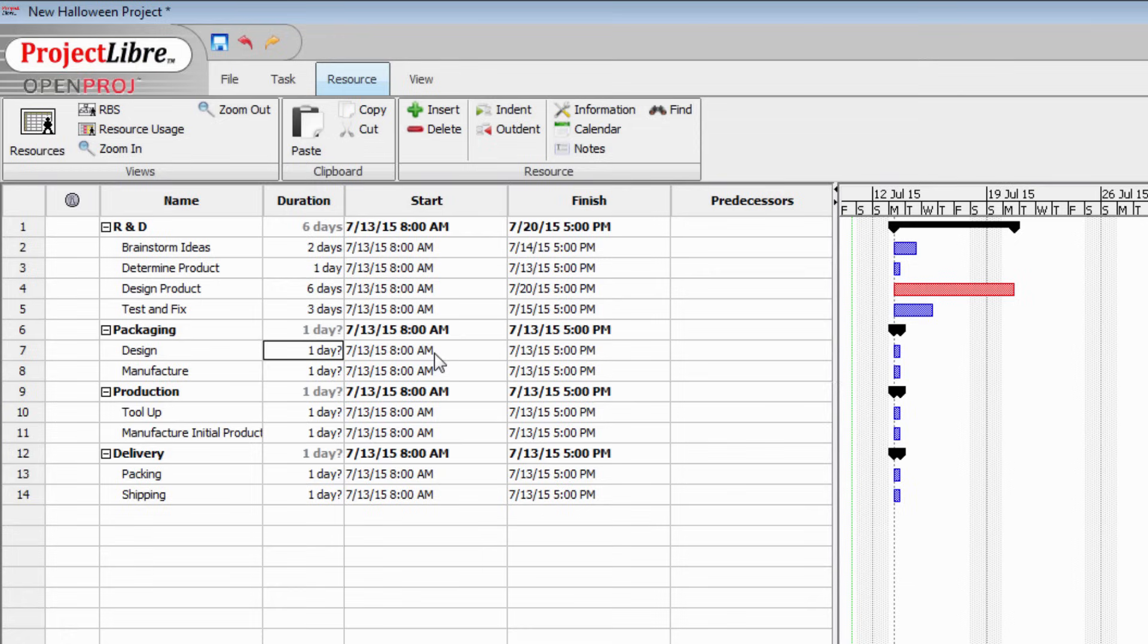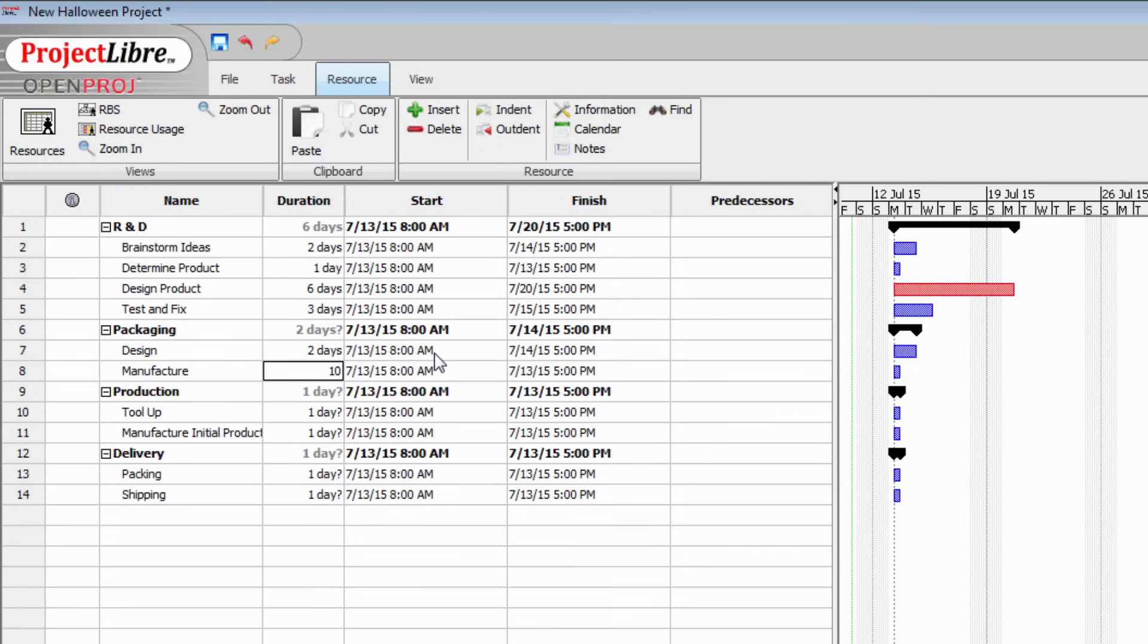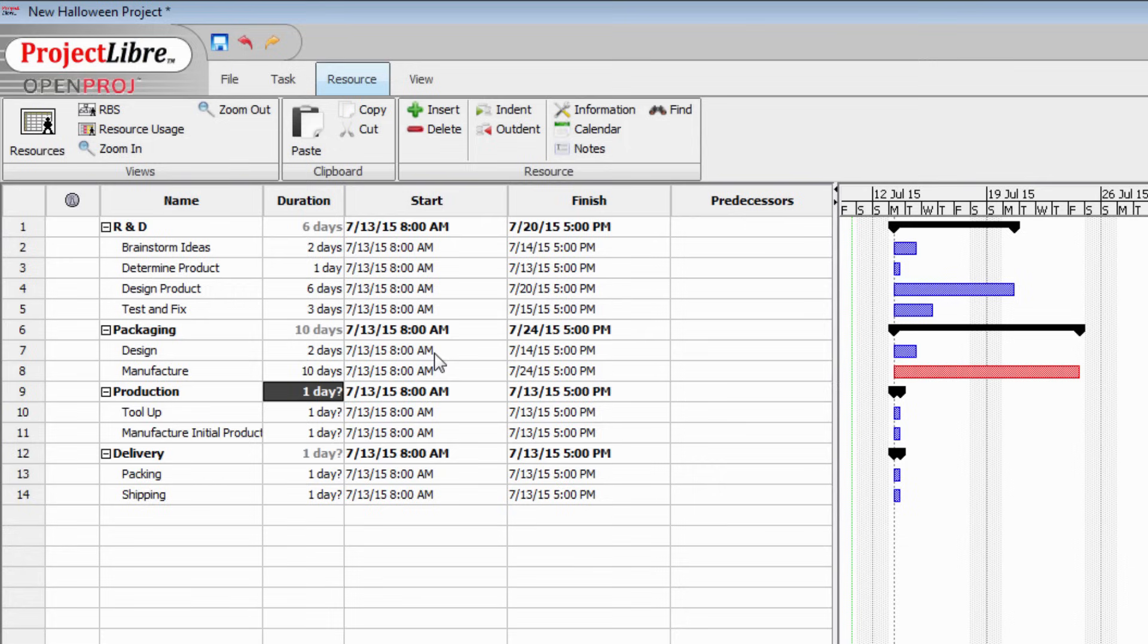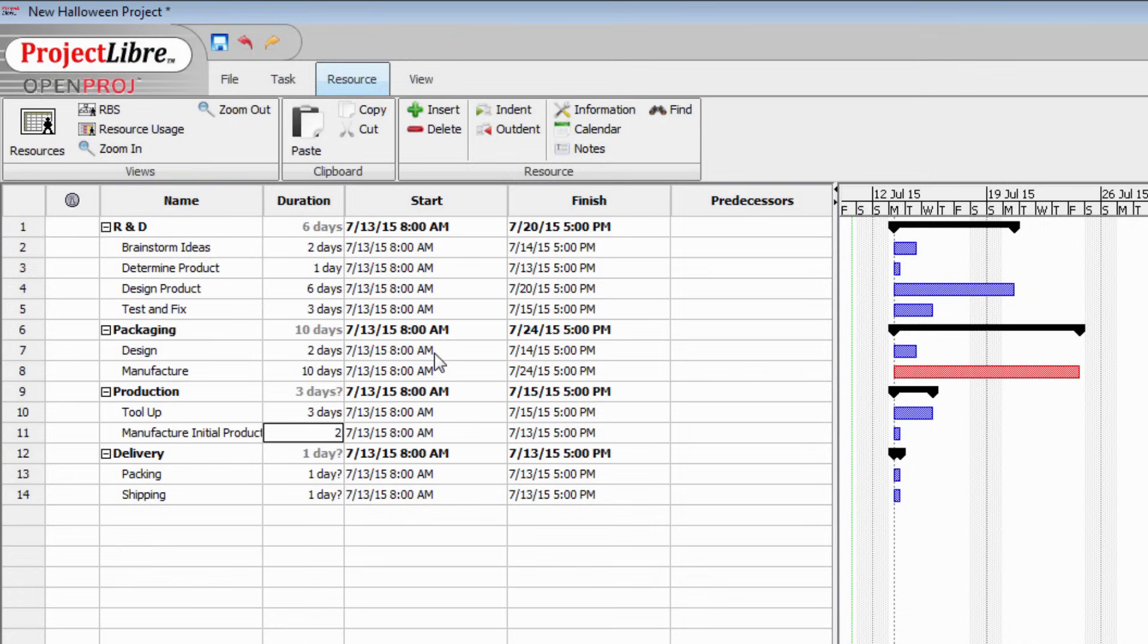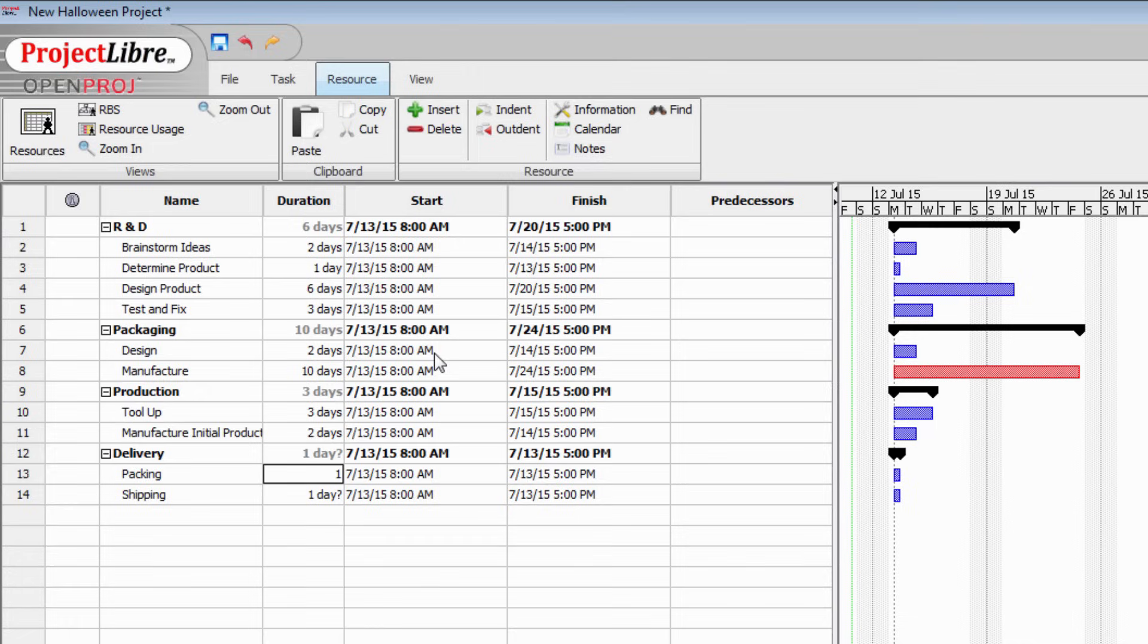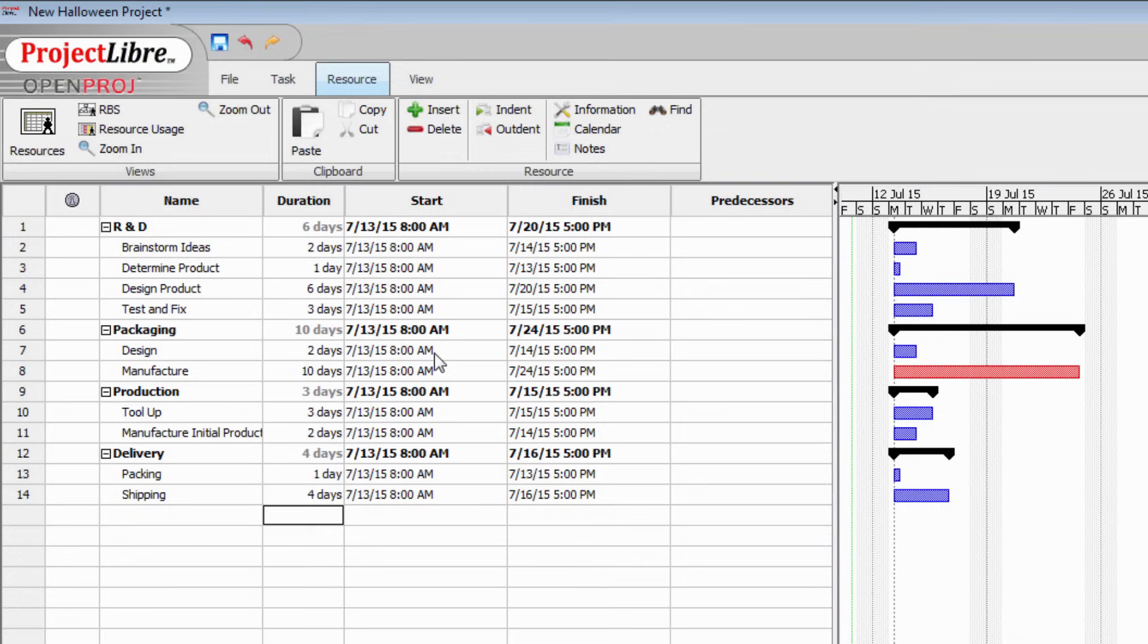In terms of packaging, we know that it's going to take us a couple of days to design the packaging. But our manufacturer is going to take ten days to produce our point of sale packaging. In terms of production, it will take us three days to tool up the plant. And then it's going to take us a couple of days to produce the initial product run. We can package everything for the initial run in one day. And then shipping is going to take us four days.